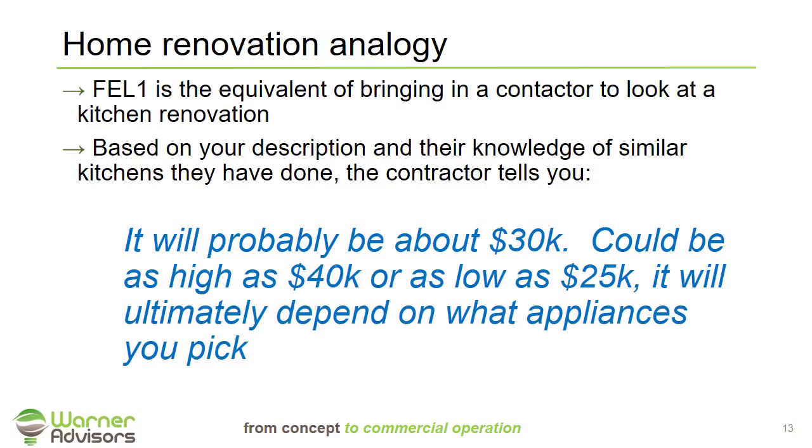FEL1 is really no different. It's a good faith, best effort estimate of what it's going to take to do that project, but you have to be careful in the level of accuracy because until a lot of the key decisions are made, it's not going to be a cost estimate that has, frankly, a real high level of accuracy.